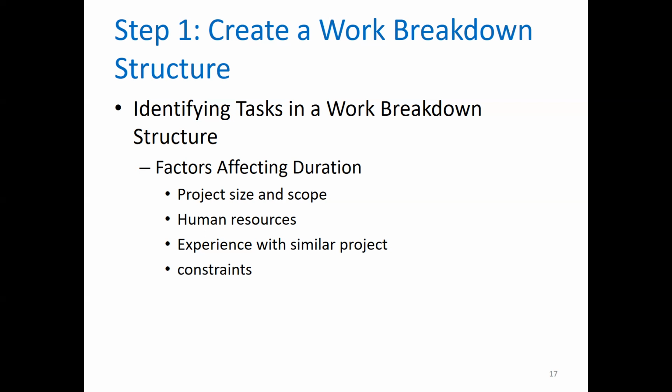And the majority of these constraints can and cannot be controlled. If you are involved in a project which involves building a bridge and all of a sudden the water supply comes to a stop, that's a constraint. Okay, and the thing is, constraints can be overcome. In terms of a house, if you cannot build something outside, you can start working from inside. For construction of a bridge, if you have no water supply from the tap, you can always hire a truck that can supply you water. But these generally come with additional resources, and these tend to affect the duration of the task.